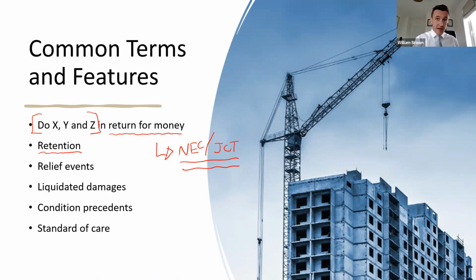If there are no defects in the works, that money is usually paid back at the end of the project, or at least half of it anyway, and the remaining half will be paid back normally a year after the works are complete, or possibly 2 years. So that's what retention is for broad brush purposes. It's a method of security, giving the employer a pot of money to call upon in the event that there's something wrong with the works. That's the logic. There's arguments for and against having retention, but that's the premise of it.